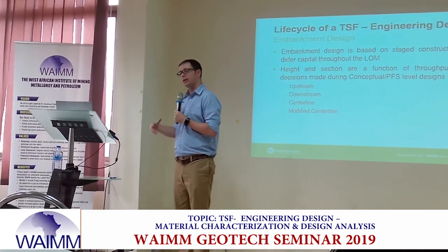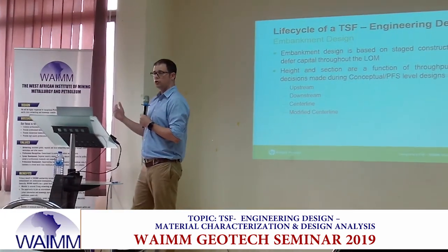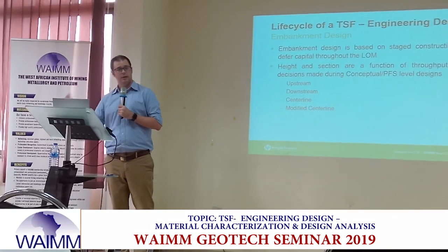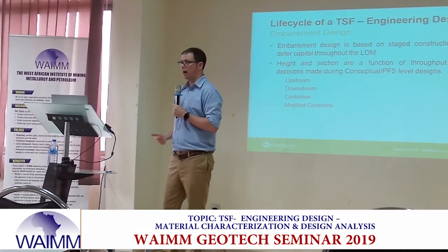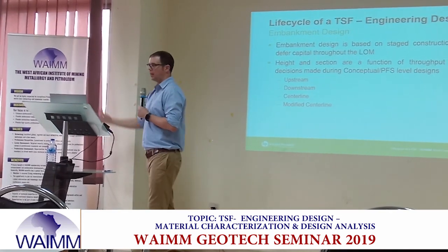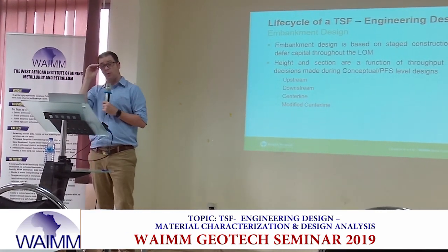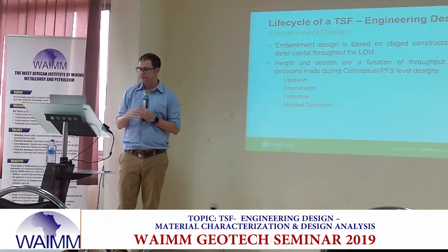Typically, for a starter facility, we might want to reduce our storage. We might only look at 1 year, because 1 year of capital deferment means a lot when you're trying to get a mine up and running. Towards the end of the life of mine, 1 year might not be as important, so maybe we'll look at 2 or 3 years.